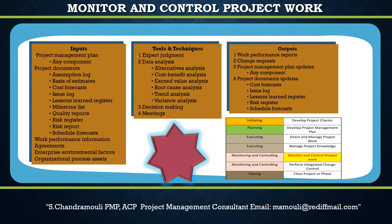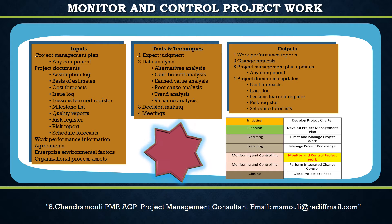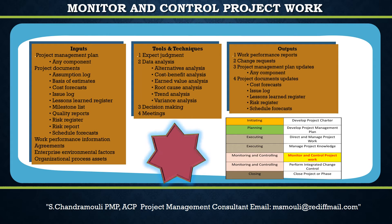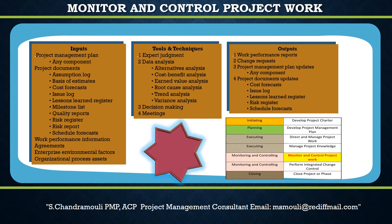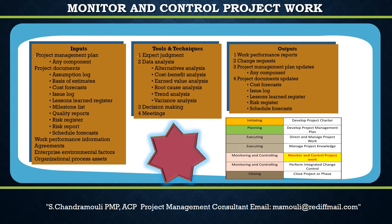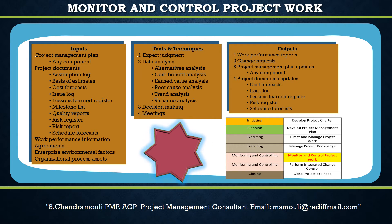Let us see the inputs of Monitor and Control Project Work Process. The first input is the Project Management Plan. Monitoring and controlling project work involves looking at all aspects of the project. Subsidiary plans within the project management plan form the basis for controlling the project. Subsidiary plans and baselines include but are not limited to: Scope Management Plan, Requirements Management Plan, Schedule Management Plan.